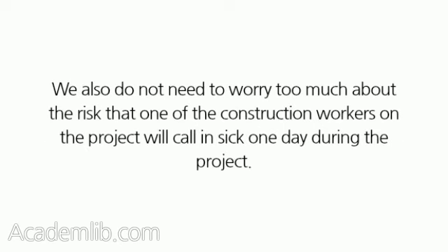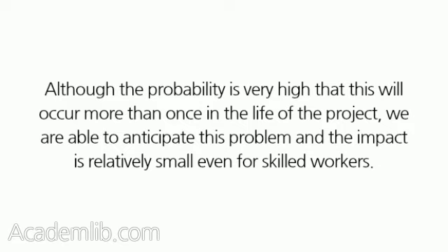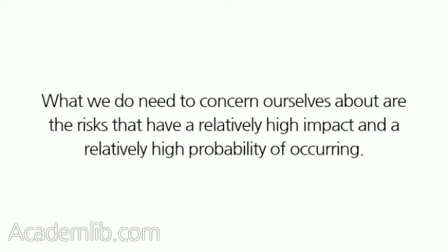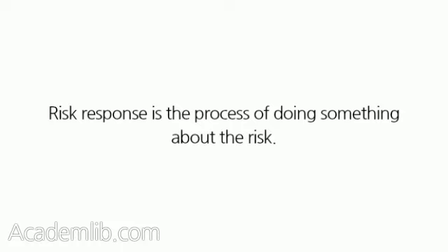We also do not need to worry too much about the risk that one of the construction workers on the project will call in sick one day during the project. Although the probability is very high that this will occur more than once in the life of the project, we are able to anticipate this problem and the impact is relatively small even for skilled workers. What we do need to concern ourselves about are the risks that have a relatively high impact and a relatively high probability of occurring. Risk response is the process of doing something about the risk.